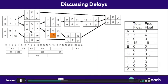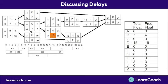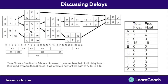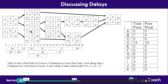Task G has a free float of three hours, meaning if delayed by more than that, it will delay other tasks beginning — specifically task I, the only task that depends on task G. For this assessment, you'll need to say what tasks will be delayed. If task G is delayed by more than six hours, task K will be delayed as well, but more importantly, the project's minimum completion time will be exceeded, creating a new critical path of A, C, G, I, K.